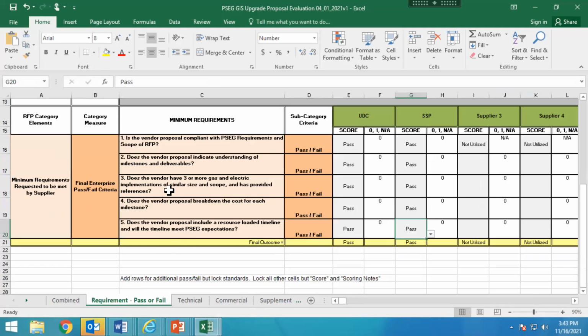So there's a section where you come up with the criteria, then you have to give the weighting for some of these. We identified the criteria for a particular vendor when they return; they have to meet this minimum criteria in order to pass on to the next level for evaluation. We identified these 5, and these are all pass/fail. One of the things that happened with my particular procurement: I started with 3 vendors, 2 of them ended up merging, so I ended up with only 2 responses.